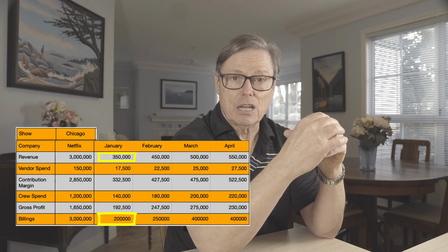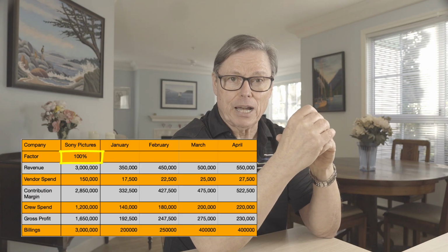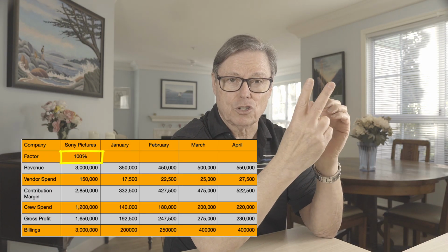The grid is the same for a backlog and front log, except the front log has a factoring percentage calculation. Unlike the backlog of shows that have been awarded, the shows listed in the front log may not proceed to award, and Blue Pony's share of the final award is not certain. Front log show totals are factored by a percentage to account for these 2 uncertainties.